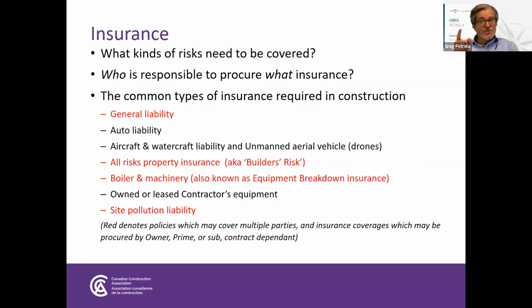The reason we have general liability on this slide as opposed to commercial general liability is because, remember what I said earlier, sometimes a policy can cover not just any designated entity, but multiple entities. In other words, every subcontractor is carrying a commercial general liability policy. You're not getting into a job site without one, including the prime and the mechanical, electrical, roofing, structural, excavator, etc. That policy follows those contractors on every single project they're working on and protects them on all their projects.